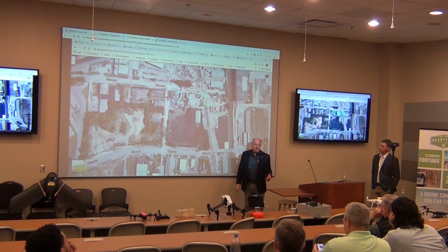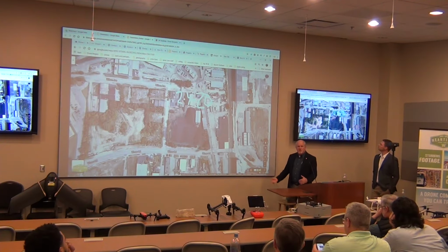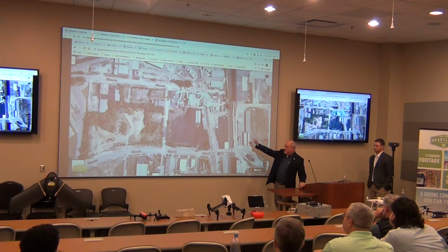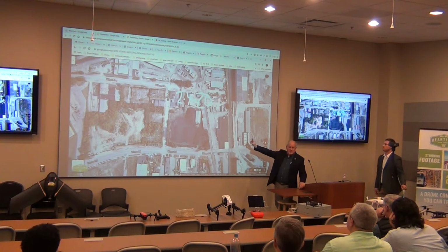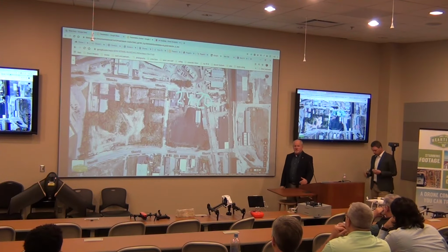But if you were an estimator and you had to estimate how much it would take to install a pump station on this particular site, part of your bid would be for moving X number of tons or cubic yards or cubic feet of asphalt-based shingles and other construction debris that completely cover the site in this photograph. Well, guess what? This photo is actually 2 years old, because for 2 years now, this site has been under some level of development. So real-time intelligence, if you dispatched a data collector, you would have real-time intelligence.